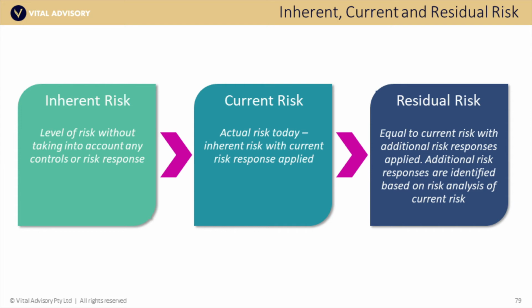Inherent risk, if I assess the level of risk without taking into account any controls, and I plot it, I'm probably going to be rating inherent risk up here in this high mark. And it may be a little lower, but if I rate an inherent risk up in this red zone, then this risk, just by its impact to us, is likely to be one of those risks where I definitely want to lower it down to an acceptable level, and I should then monitor those key controls that keep it down there. So the benefit of identifying inherent risk is it helps you know which are the worst case scenario risks that you really must keep an eye on.